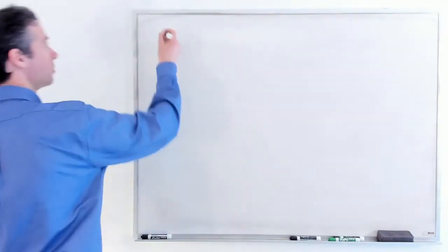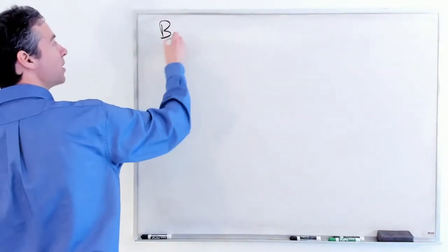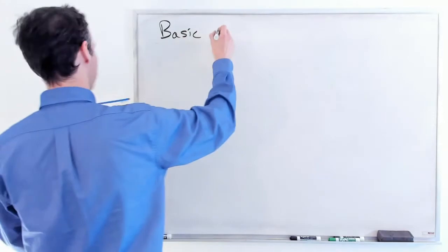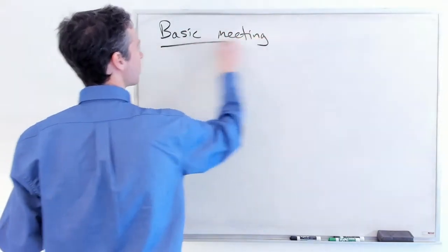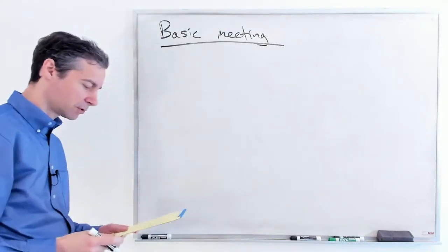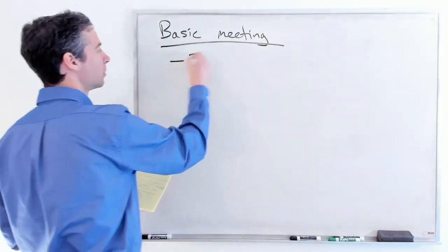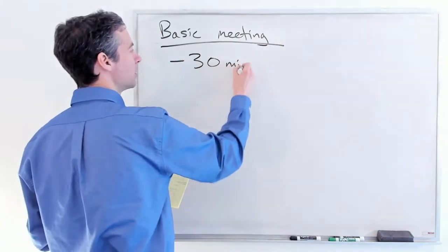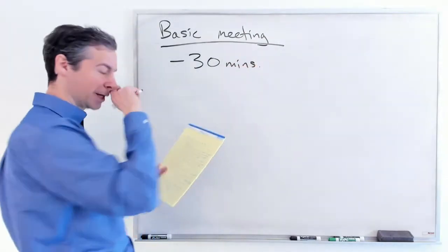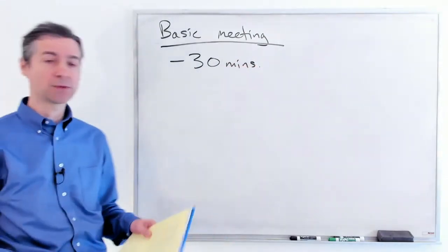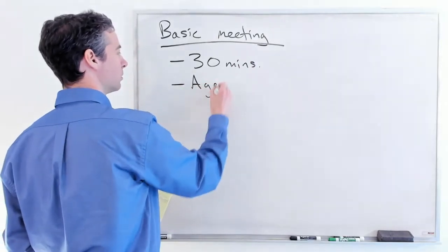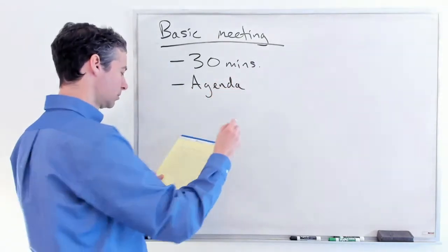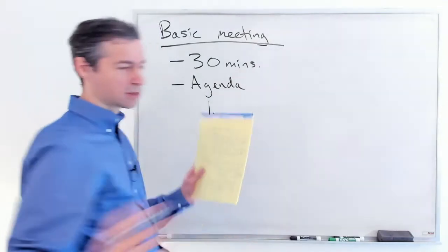In 342, these are our basic guidelines for the meeting. Now, these hold, I think, for actually a lot of stuff for a regular Scrum as well. Most people are only going to need 30 minutes for these meetings. Okay, you may need a longer meeting if you have a longer sprint. The agenda that sprint retrospectives follow, there's lots of ways to do it.